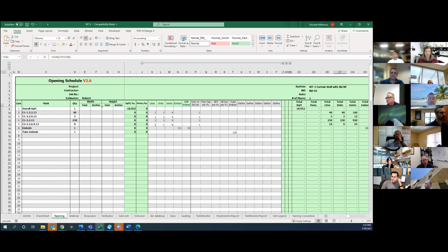Because all of you are aware that that's one of the things you run into with your pallet schedules. The field goes and makes your pallet schedule, and in the process of making it, they realize they're not really going to get 5 units per pallet. They've got spots where they're only able to get 3, or they're getting 2. And now you're over budget because you didn't have enough pallets. It'd be fantastic if your pallet schedule was done up front and built into the model, so we really know how many pallets we planned on getting. But that's down the road a bit, but it would be really cool.